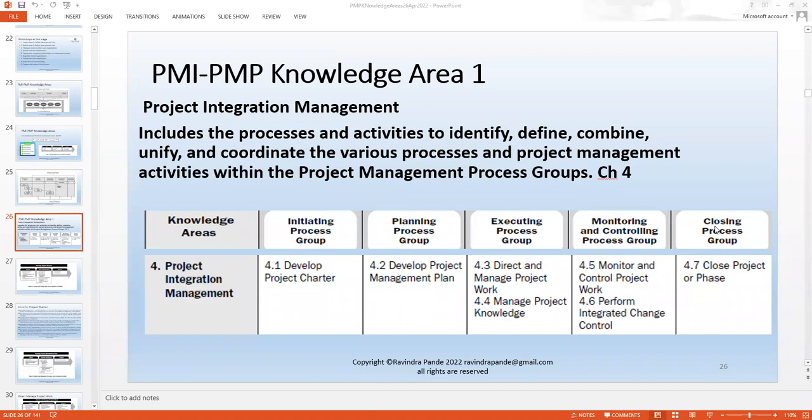So what does a project charter include? A project charter includes a complete statement of work, the contracts, the agreement, and the system requirement specification, which also includes the high-level conceptual solution, the use case diagrams, and the Excel-based auditable artifact for the decision you have chosen to implement, or the options you have decided to adopt, like the biometrics of the world, like the iris scanners of the world.